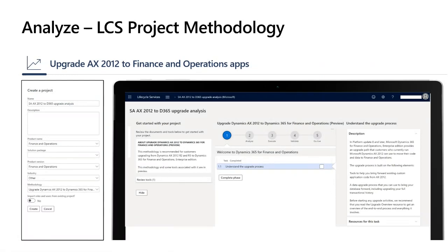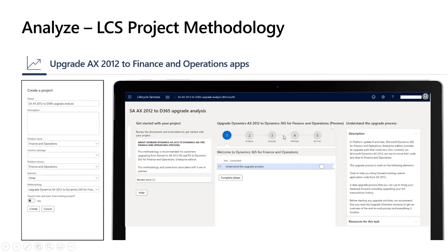In terms of creating the LCS project, when creating a project you give it a name, pick the product (Finance and Operations), and select the methodology. You have different methodologies for fresh implementation, trial, or upgrade — make sure to pick the upgrade methodology. Once the project is created, the methodology reflects the phases showcased in this presentation, and under each phase you will see the same sub-activities described here.